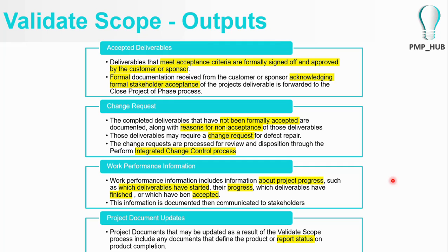So end of the day, as a project manager, with your leadership skills and with the convincing skills, either you try to trade it off or sometimes you will have to get a correction done with your team. Maybe there's a costing, so maybe the customer agrees that yes, what we told is wrong in the scope statement, that tax computation is wrong, but this is the correct tax computation, so please get this done, incorporate it into your software package. The customer agrees that yes, it is a misfire from their side, and then it has to go into the